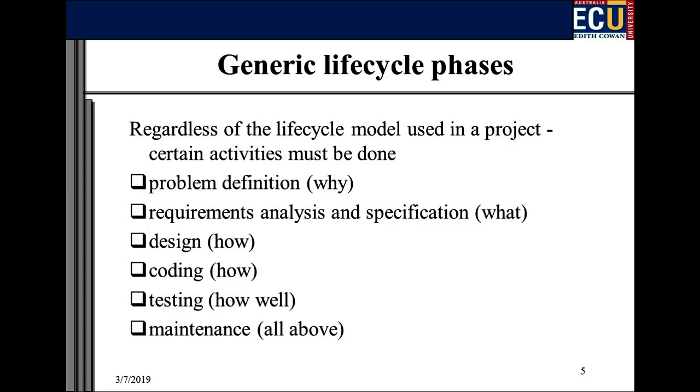But unfortunately, yes. I was going to say that's not always true. If they want something that's outside scope, that needs more money. Well, sure. This is true. I mean, you charge them for every alteration, but if you're a project manager, you kind of even want to avoid that. The programmers themselves too.